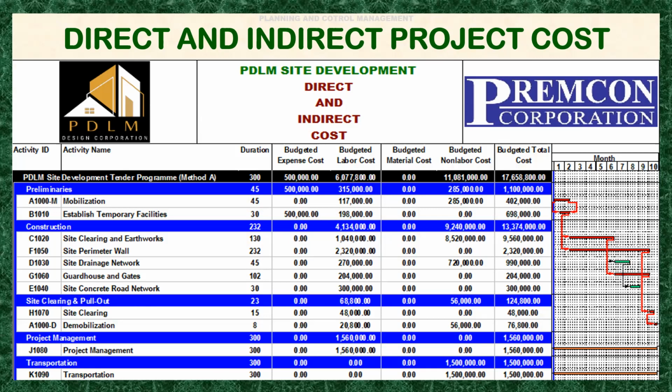Also for the contractor's profit, the contractor must be given a reasonable portion of the direct and indirect cost for its effort in acquiring and organizing project requirements, and of course royalties. And the last is the taxes, which are required in almost every state in several forms.